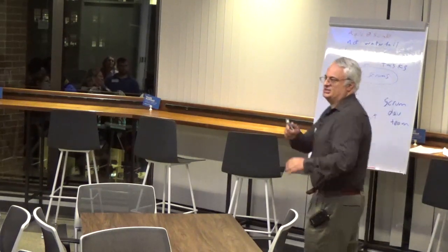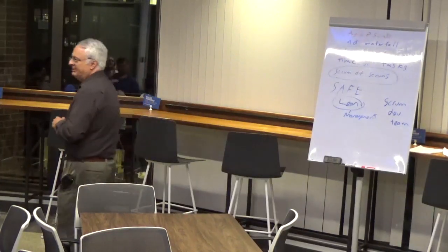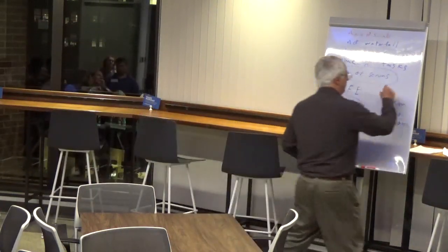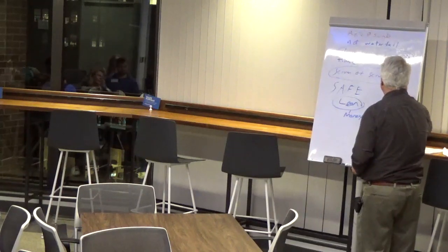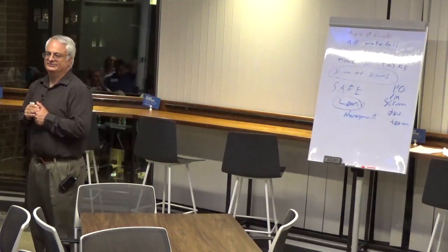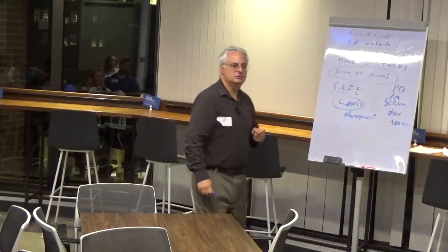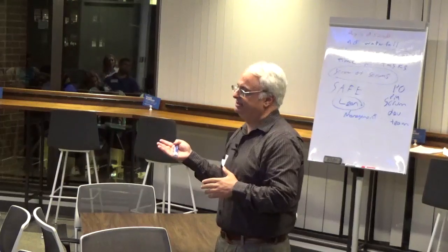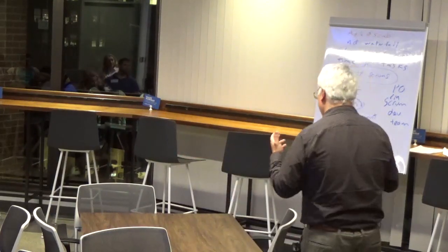Now there is an interesting thing we were discussing earlier with a few people quietly, but as part of this, they define very specifically. Do people feel comfortable with what a product owner is versus a product manager? Can anyone define what a product owner is? Anybody who has studied Scrum? You're the voice of the business to the development team. That's a good part of it. They're also the people who day to day work with the dev team to groom the backlog, right? To make sure they get the right stuff for the developers. That's a product owner's job, which isn't everything in product management, right? And that's part of the problem.